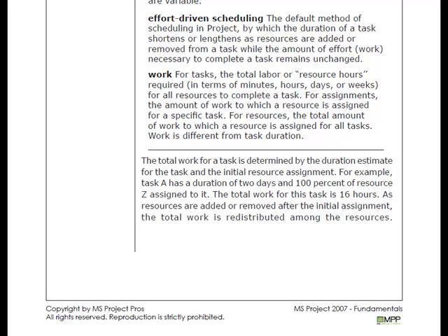The notion of effort-driven scheduling, as you can see here in the task type settings area, is essentially how your project is either going to be extended or shortened from a duration perspective as you load up or assign additional resources. The way you have set your task types is going to be important.